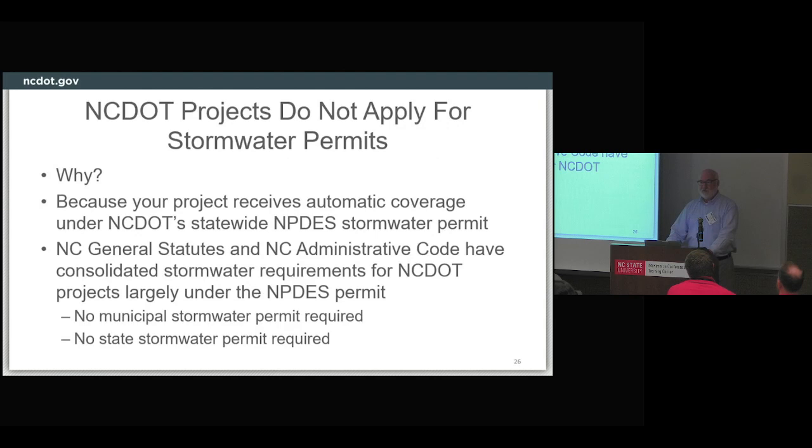But DOT projects are different. We do not apply for stormwater permits. What's unique about us is that we have a blanket statewide NPDES stormwater permit that provides automatic permit coverage for your projects. Additionally, North Carolina general statutes and North Carolina administrative code have been crafted over time such that the DOT does not apply for municipal stormwater permits, nor do we apply for state stormwater permits. So everything's been kind of consolidated into the NPDES permit.